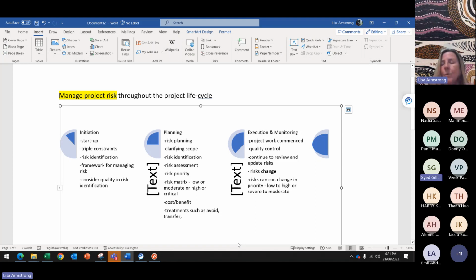They will change. We will have initial risks that are no longer relevant. They're not even gone to low. We finished the work. Perhaps we had risks for our first work package. We've now finished that, and so the risks for that first work package are no longer relevant. We can actually retire risks. They can go. They are no longer confronting our project.